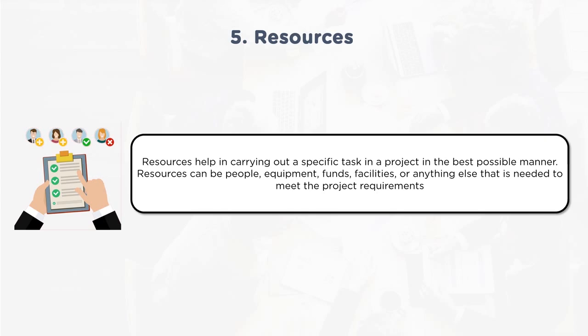That is compromising, problem solving, smoothing, accommodating. Whichever helps for that project scenario, for the project objectives, that technique has to be taken up. Here the resolution is not at the specific individual's preference. It is with the objective of whether the project has any impact. What kind of impact? Positive or negative? If it is negative, no, that's not the direction. The direction should be ensuring the project gets value through this conflict resolution. So the project manager should own it. It's an accountability of a project manager.